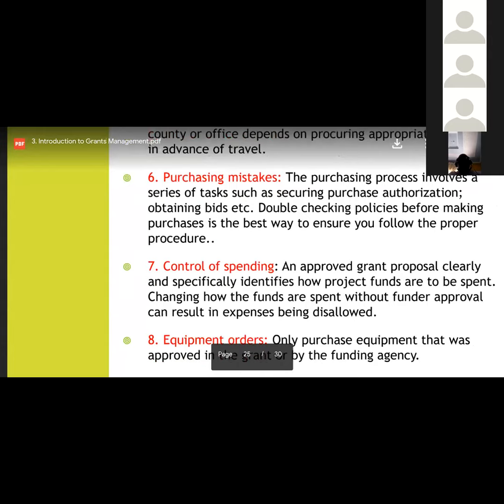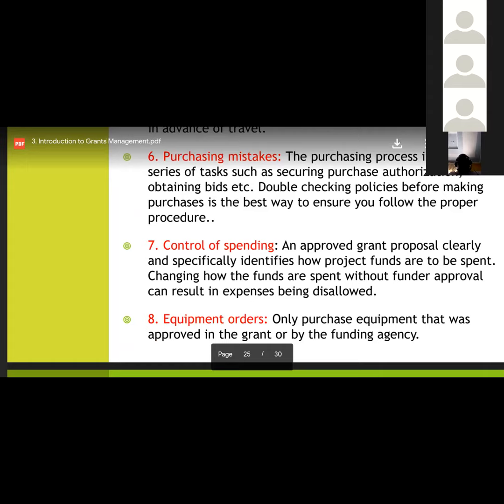Then the other thing is also the issue of controlling spending. It's always good to make sure that we are able to control spending as much as possible, and ensuring that we have an approved grant proposal that clearly and specifically identifies how the project funds are to be spent. Changing how these funds are spent without the funding agency's approval can result in certain expenses being disallowed. So it's always good to make sure that there's controlled spending, because uncontrolled spending will always be an issue for